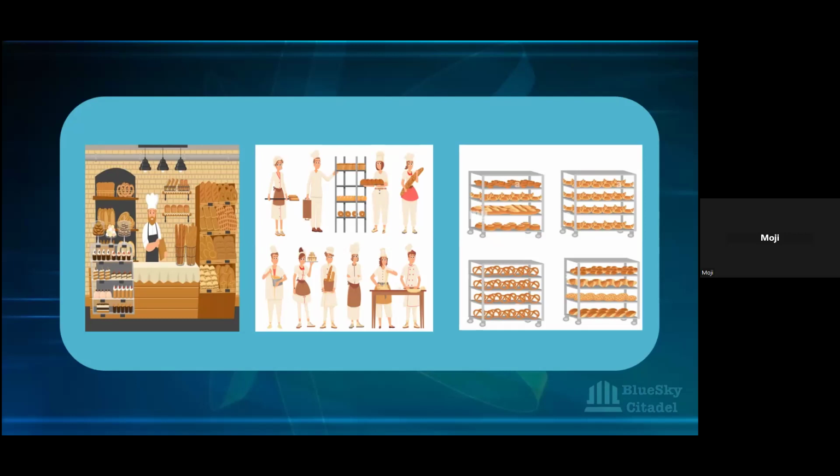So that when the product owner comes and says, I want you to work on 10 stories and all that, even if we had done 10 stories in the previous sprint, when we had full capacity, we'll be able to negotiate, which comes on you mostly as a scrum master, to say, oh, I don't have full capacity. I have maybe 2 staff that are not going to be around, and that's going to affect things. So can we reduce the number of stories that we need to work on?